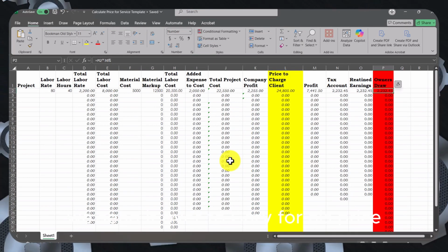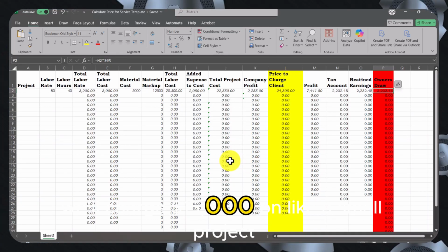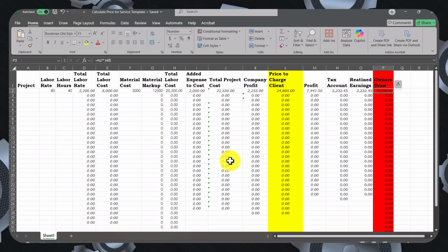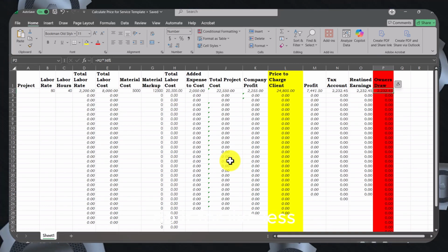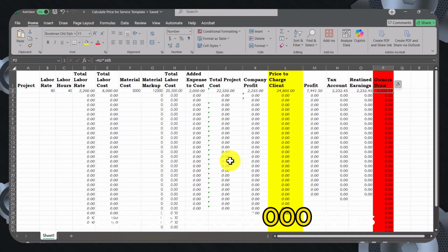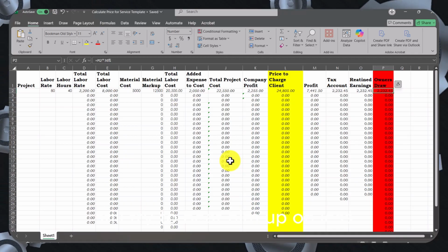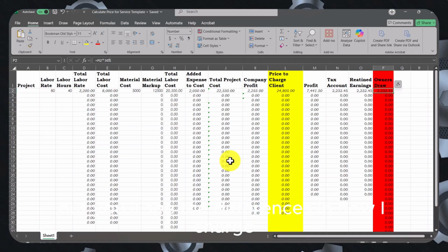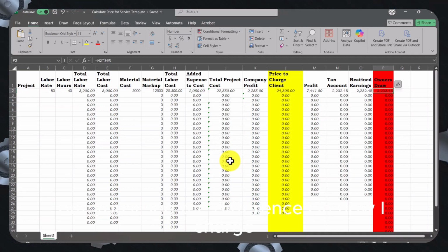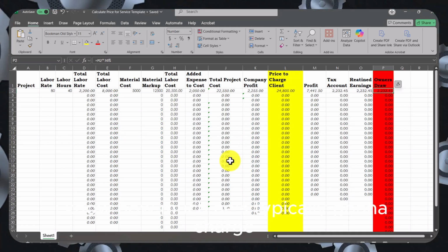We'll send it over to Gary for his price. But usually on a small job, we'll charge $15,000 on a small project, and then we'll get Gary to do it for less. We'll try to beat him down to $10,000 or less. But if it's a large project, I usually bid $40,000 to $50,000 and then give him like $30,000. Still try to beat him down on price. But you'll see the differences in how I charge when it comes to engineering, because I've been working with him so long, I know how much he's typically going to charge.